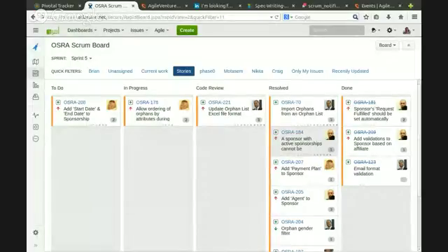In theory, we should finish that sprint and start a new one. In real life, it is always an issue that you make the last sprint 1 week longer to handle all things. Yeah. Let's just do it 1 week longer, and the main reason is we just don't have enough resources to make a planning meeting and retrospective meeting now. It's just better to finish all that is left here and push it into production. After that, have a retrospective meeting and decide what to do.